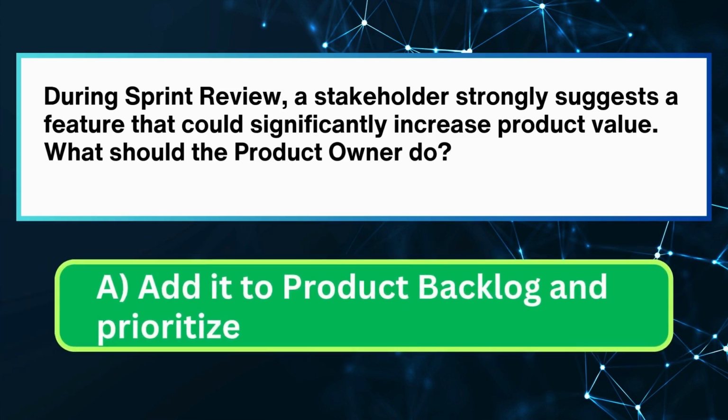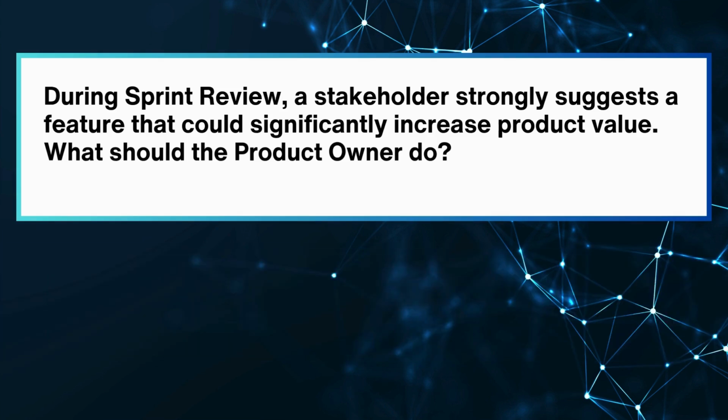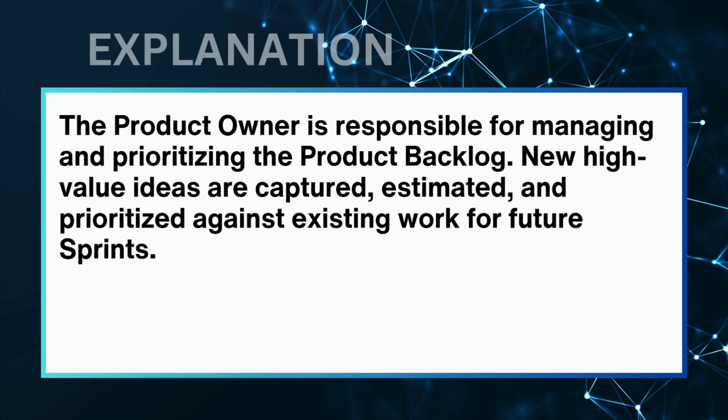The correct answer is A. Add it to product backlog and prioritize. The product owner is responsible for managing and prioritizing the product backlog. New high-value ideas are captured, estimated, and prioritized against existing work for future sprints.